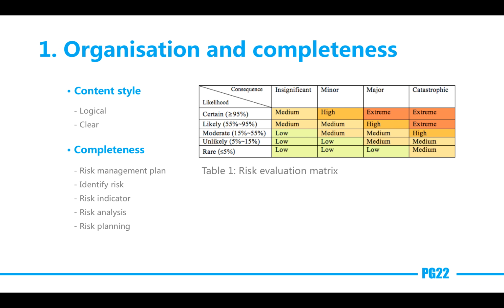Then the risks are identified in the next section. The risks are classified in 7 areas. Each risk is clearly explained with its catastrophic outcome, scenario, and root cause. Almost all the risks are included in this section. Then some potential risk indicators are listed in a table to show the potential activities which may cause risks.